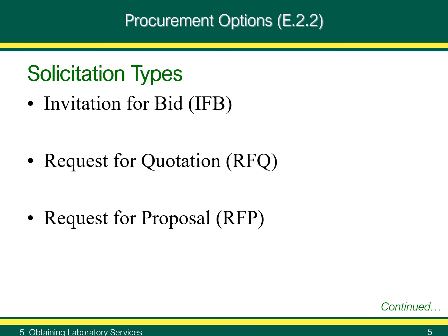Negotiations may take place with firms who submit proposals in a competitive range. This type of solicitation generally addresses major long-term contractor support, for example, support lasting several years. It relies on a competitive bid process based mainly on technical capability, or best value, rather than on price alone.